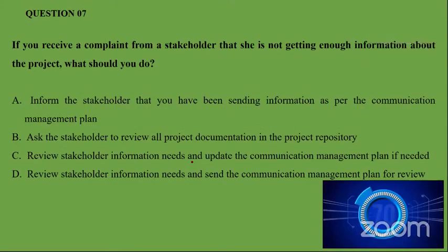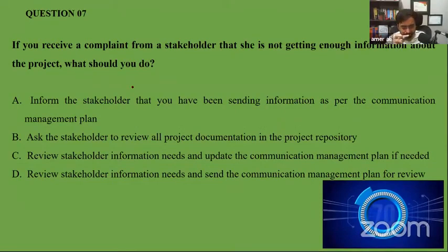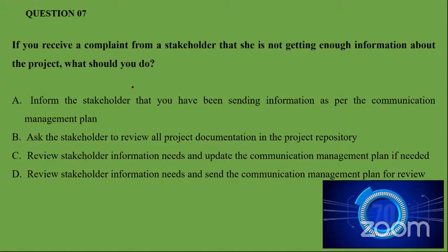Okay, let's solve the next question. Who will solve it? Okay, Adil, Malik Adil. Yes, sir. Please. If you receive a complaint from a stakeholder that she is not getting enough information about the project, what should you do? A, inform the stakeholder that you have been sending information as per the communication management plan. B, ask the stakeholder to review all the project documents in the project repository. C, review stakeholder information needs and update the communication management plan if needed. D, review stakeholder information needs and send the communication management plan for review.